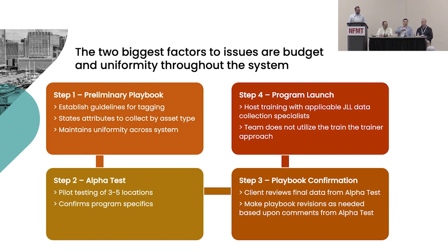So we were able to build a dashboard to track where it is in the different phases, and then we set milestones on commissioning of systems. One milestone would be the commissioning of systems, another one would be the occupancy certificate. You had to be this level complete, and when we started falling behind, interrupting payments is a good way to get the contractor's attention.